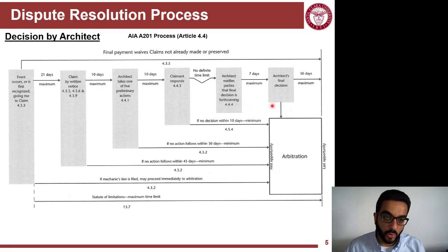The owner here can consult with the architect, which is funny because in the AIA contract, the architect is the owner's representative. Per the AIA contract A201 for design-bid-build, the owner is kind of on the owner's side in some way. So the architect will have the power to be the judge initially. This contract calls for the architect to intervene and try to resolve any conflicts, and that will be by just looking at the case and trying to resolve it.